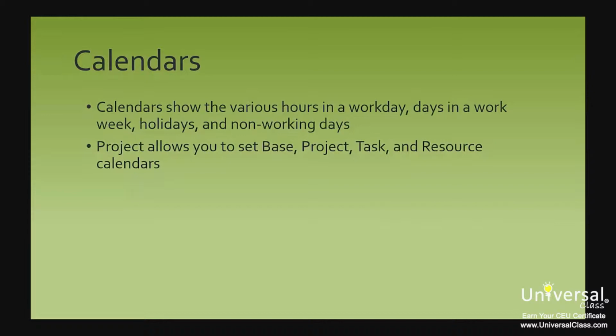In Project 2013, the calendar shows the various hours in a workday, the days in a work week, holidays, and non-working days on which a project schedule is based. Project allows you to set base, project, task, and resource calendars. A resource is anything you use to accomplish a task or to advance and complete the project. Resources can be employees, equipment, and other things.